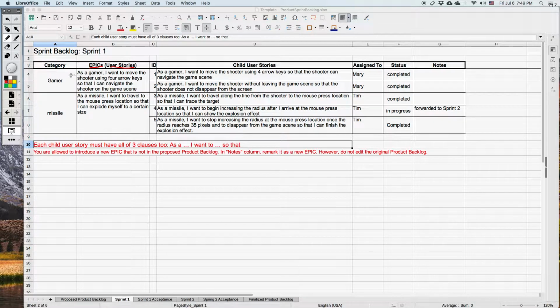Anyway, those two are picked up and I copy them, and then split the epic into multiple child user stories. This part is also very important because as you begin implementing the user story, in many cases you find that it is too big or too complex. Then if you break it into smaller pieces, it's a lot easier to handle.